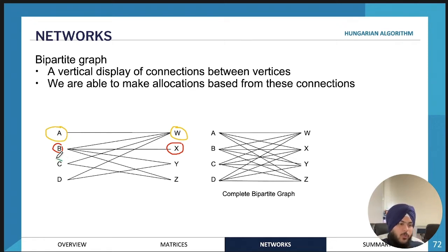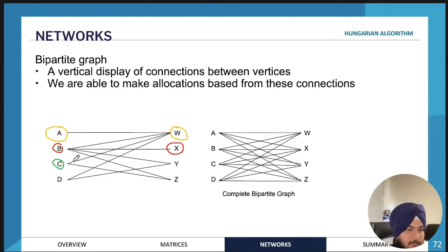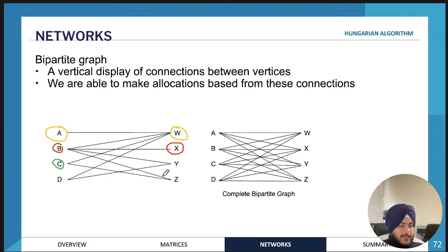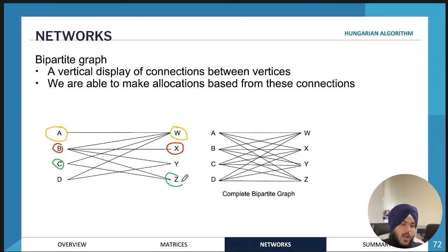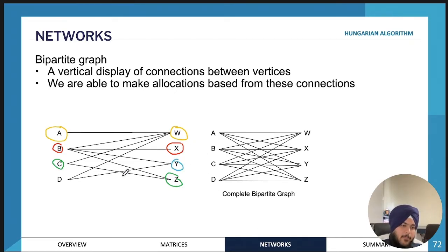Person C can do both task W and task Z. However, task Z can only be done by person B or person C, and person B has already been allocated. So task Z must be done by person C, and therefore the last task, task Y, must be done by person D. That's how we work through this network.